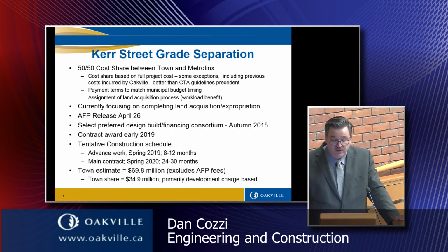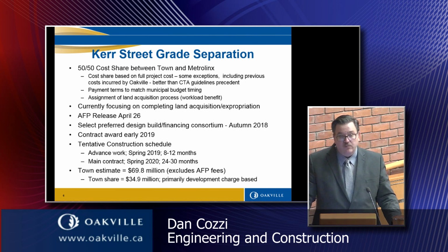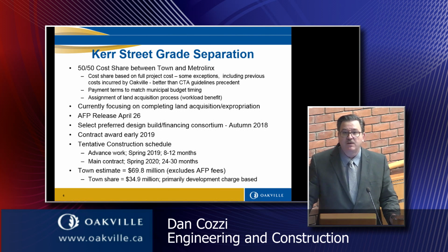Payment terms, again, will match our municipal budget timing, so we don't have to pay them back till 2023 or 2024. And in this case, they've agreed to assign the land or take on the responsibility of some of the land dealings. And that's what we've both been focusing on. The land acquisitions for Kerr Street is the most complicated piece in the puzzle because we need the land within a certain time frame in order to move forward on this project.